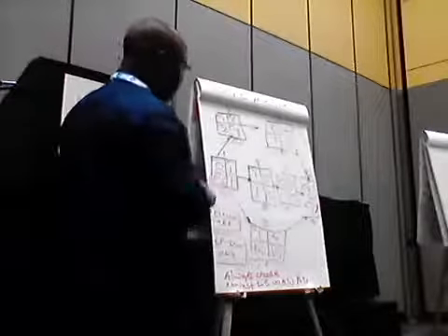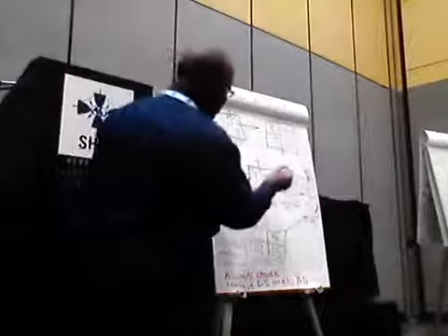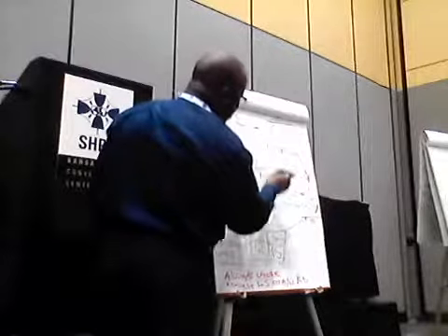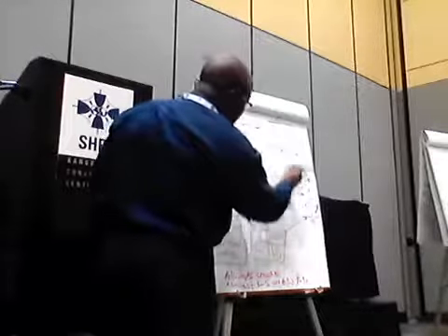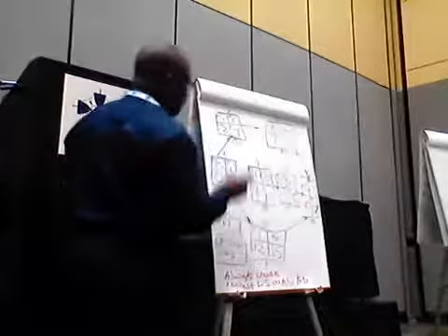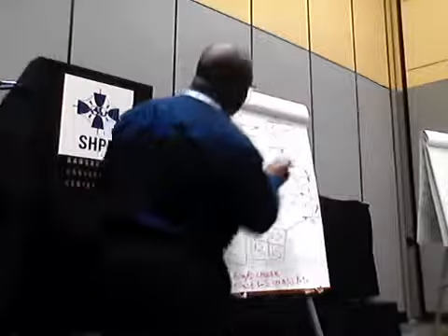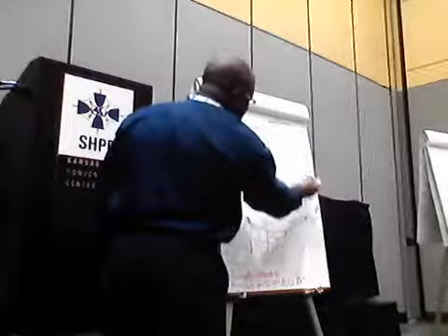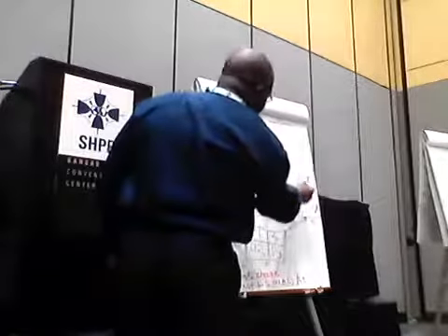Do you know how you find that out? Take a look at activity B. I cannot delay activity B without affecting activity C. I can, however, delay activity E without affecting activity G by 1 day, because the difference between this and this is 1. I cannot delay anything on the critical path.